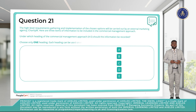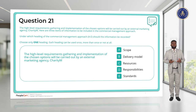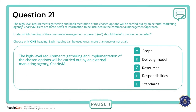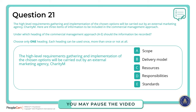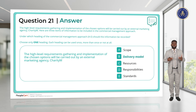Question 21. The high-level requirement gathering and implementation of the chosen option will be carried out by an external marketing agency. When looking at this, this is our delivery model — therefore the answer is B. For this type of question, it is a good idea to look at the appropriate management approach in your textbook and make sure you understand what we mean by scope, delivery model, resources, responsibilities, standards and so on.